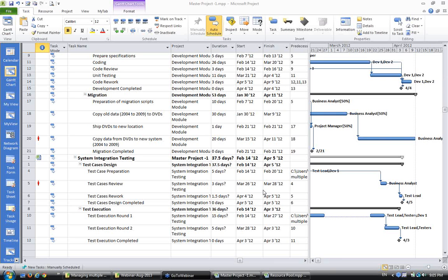And therefore, whenever you open the resource pool, we always advise that you open it in read-only mode, not the write mode. Even if by mistake any project manager makes a mistake, it can be a problem for all the other project managers.